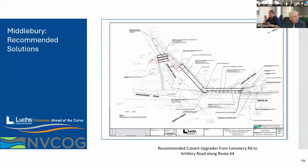Yeah, so the conclusion of this project is the 30% designs. This is a planning and design project. Grant sources will be identified and a grant narrative drafted for implementation funding, but that's not part of this project. Yeah, but they could take our report and our cost estimates and things, and they could start with the grant list we have, start going for grants.